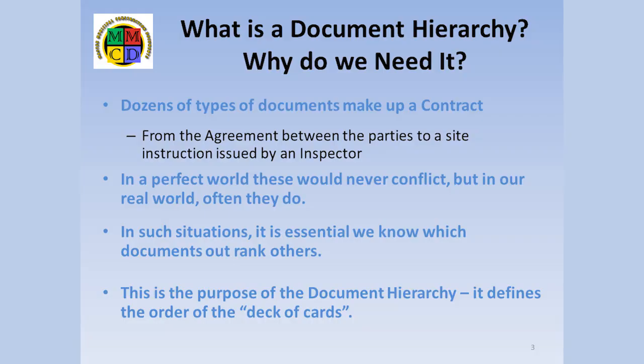In addition, there are most often supplementals to all these documents to reflect owner preferences and items which are unique to a project. If that were not enough, drawings and specifications often reference other documents such as CSA or ASTM standards. By doing so, these too become contract documents.